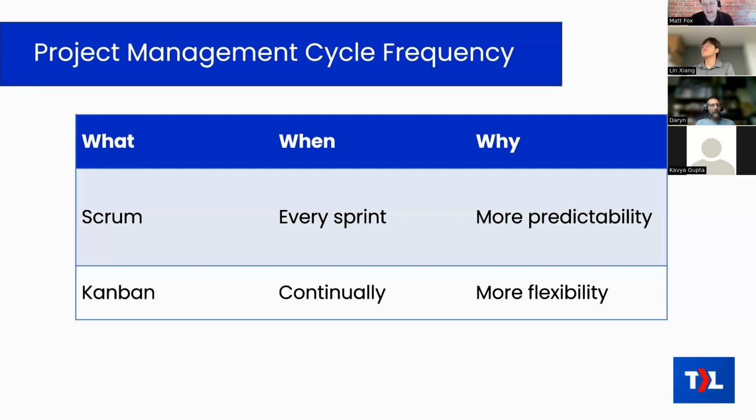The benefit is that it gives your engineers some stability and predictability to know, okay, these are the expectations for this sprint. This is our goals that we're trying to get through, and it's not going to change during the sprint. I can't say anything about what's going to happen next sprint, but we're not in that sprint yet. But at least for the sprint that we're working on now, we got some predictability, and I can just know what the expectations are, and I can do that. So that's what you get if you're doing a Scrum method.